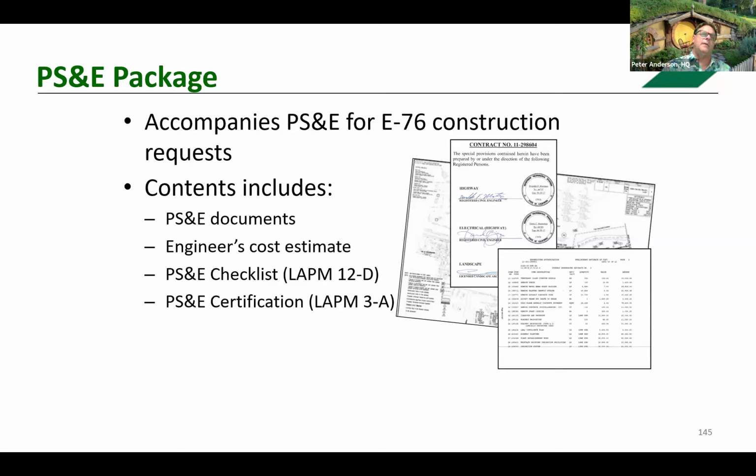So the county ultimately came to this decision. Yes, hiring a contractor was going to be cost prohibitive. They turned around and said, we'll do it by force account. They'll do it with their own forces. They already did the justification because they went through the process and came back and said, nobody's bidding on it. We can do this cheaper ourselves. And that's a perfect example of when force account does make sense.